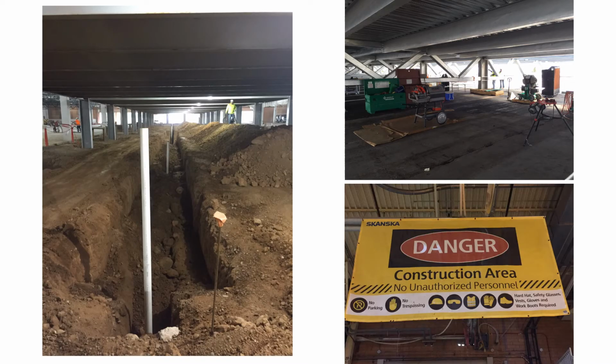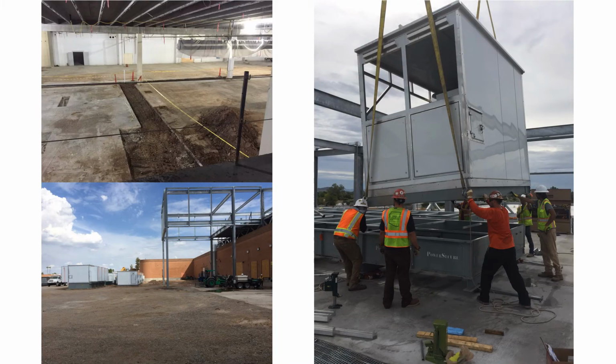Demolition inside and around the building began in late 2015, while construction began in early 2016 and finished earlier this year. This was a design-build project, but the owner was altering plans throughout construction. When I left at the end of July, the 8th set of plans had just been released. There was a general schedule, but no definite deadline until I was leaving. The owner needed to have parts of the building finished by the first of the new year for people to begin working. Construction was moving slow, depending on what could be done, but started to pick up towards the end.